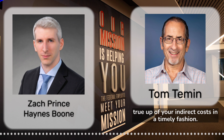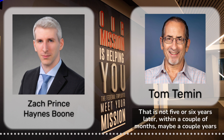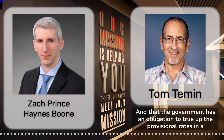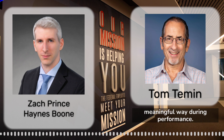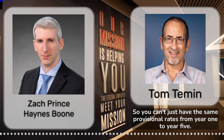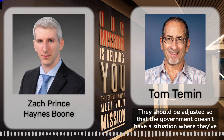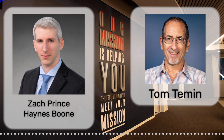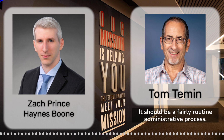in a timely fashion that is not 5 or 6 years later, within a couple of months, maybe a couple of years at most, and that the government has an obligation to true up the provisional rates in a meaningful way during performance. So you can't just have the same provisional rates from year 1 to year 5. They should be adjusted so that the government doesn't have a situation where they've paid you too much or too little, and then you have to do this true up process later. It should be a fairly routine administrative process. It often doesn't happen that way.